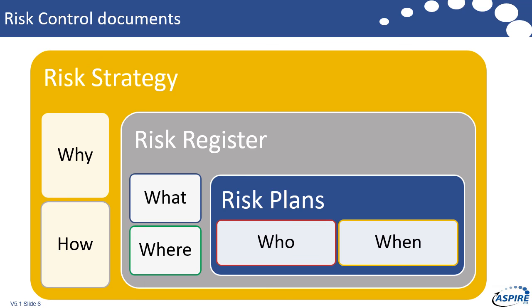So we need to have criteria for aggregation, for how we look across all those different risks going on in the projects and spot the ones that are going to aggregate together. Think about Piper Alpha. Which are the threats running across your program that could create that chain reaction of events that creates a major problem for the program, and maybe an even bigger problem for the portfolio.